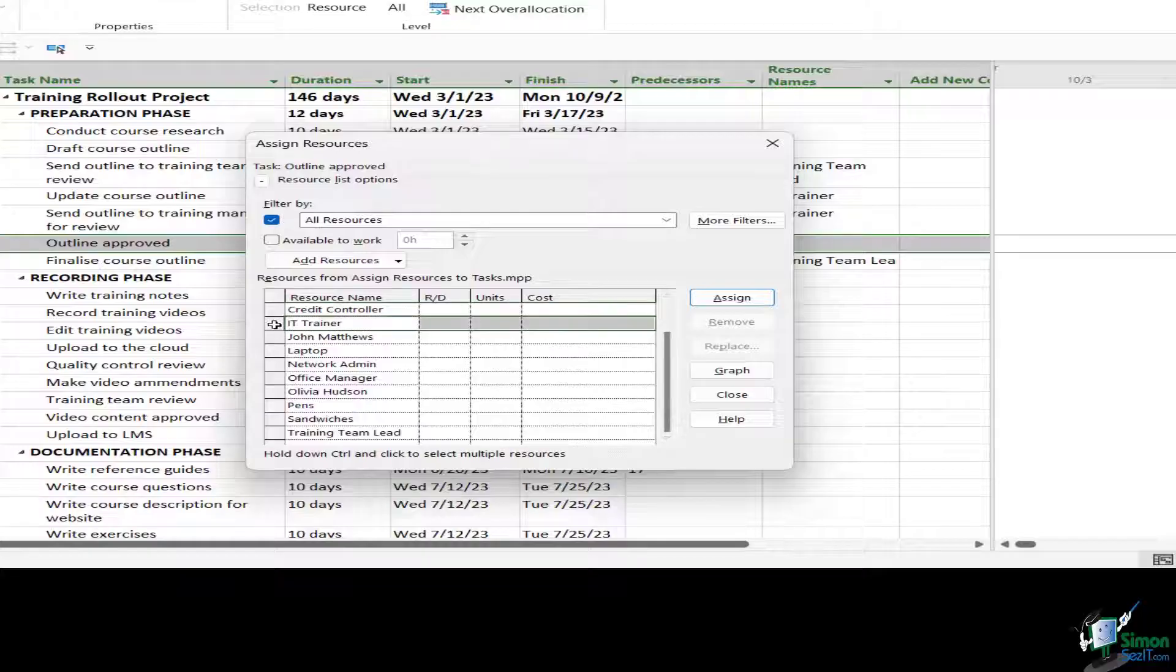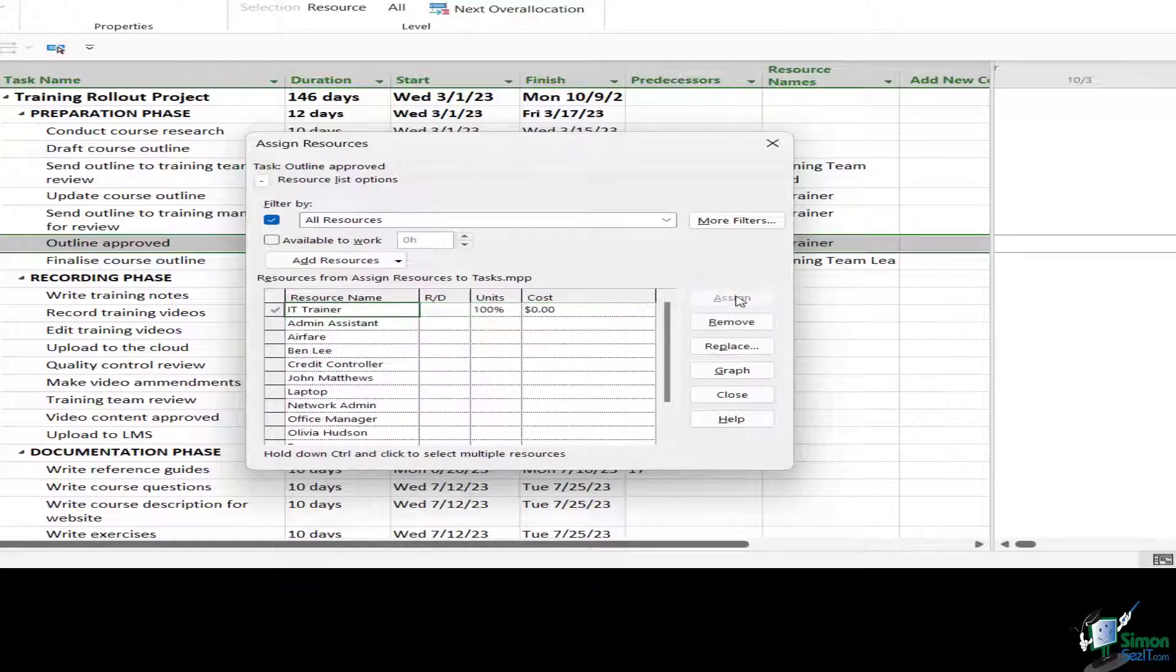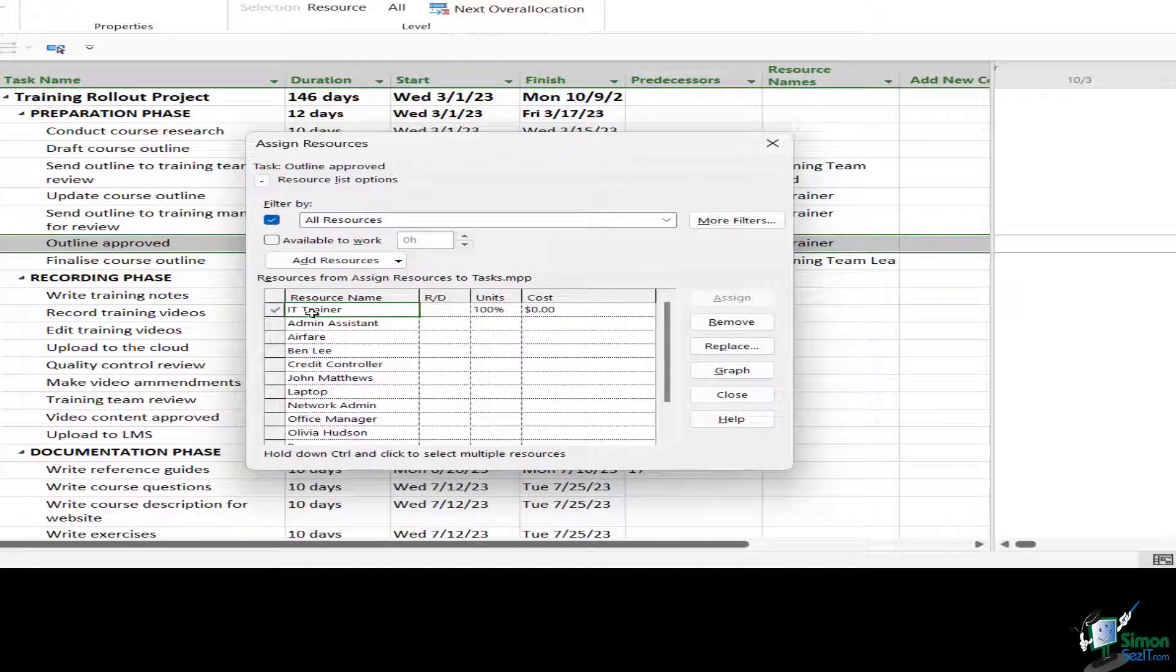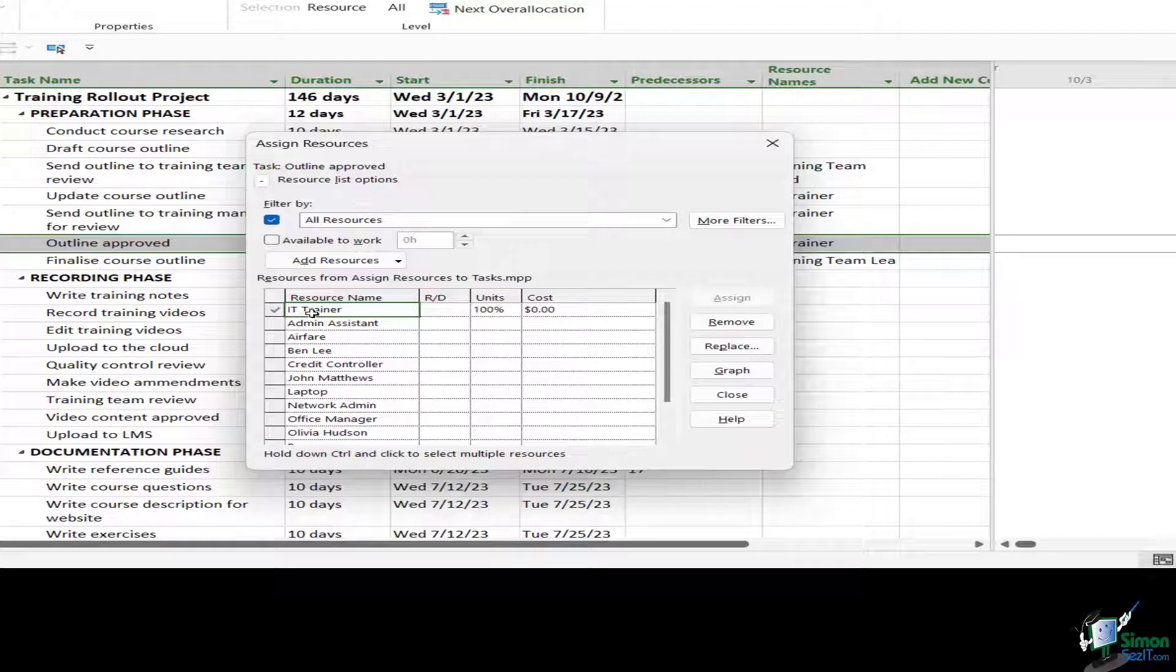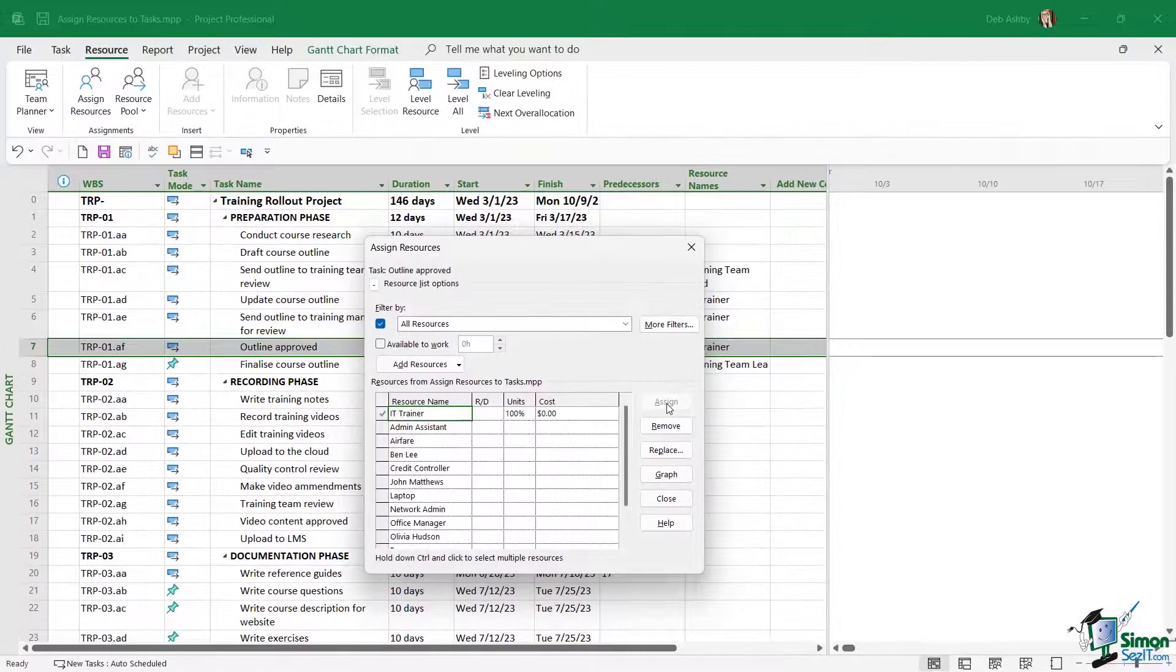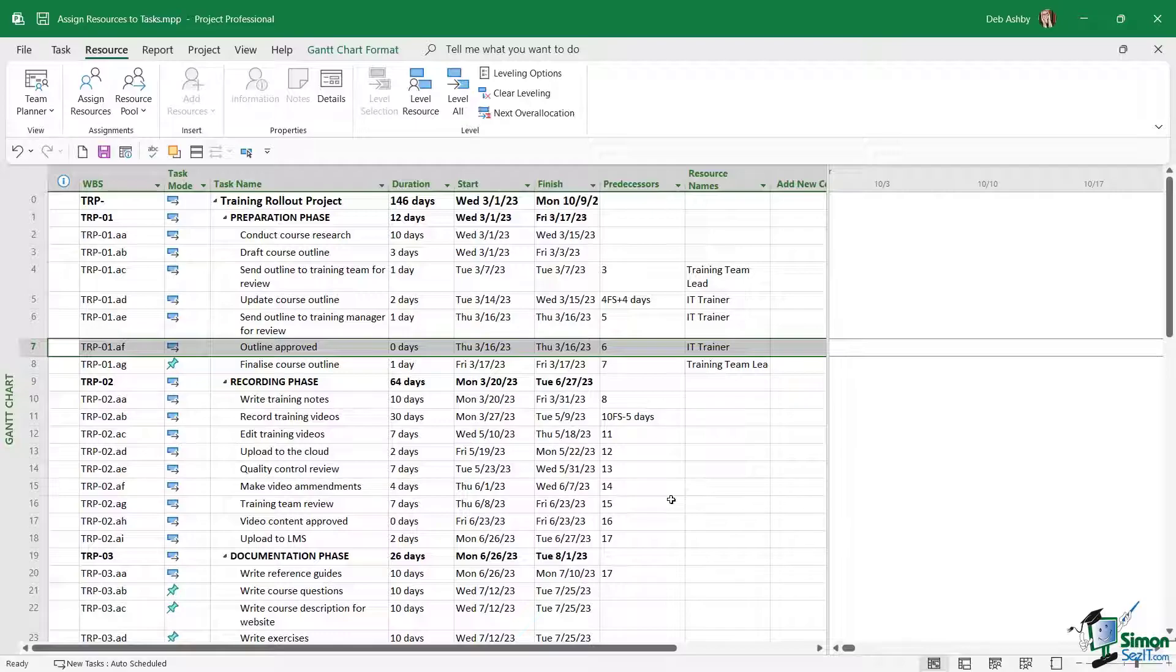Now to assign a resource we simply need to scroll through the list. I'm going to find IT trainer and then we just need to click on assign. If I need to assign more people, I can simply go through, select, and click assign again. And if I want to select multiple resources from this list, I can simply hold down Control and then click assign.